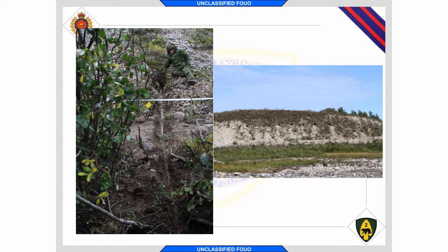Next. Some of the pipes were close enough to the surface that we could excavate them manually. This one we found on the north side. This was the first one that kind of gave us an idea what the start state was here. This one was in its full length, so 21 feet with one crimped end that we figure they crimped so they could jam them in, and then it still had the cap on the other end. So that one gave us an idea of our start state that we were dealing with.